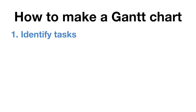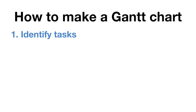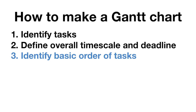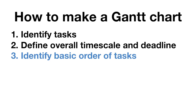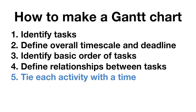Step one is to identify the tasks for your project. Step two, you define your overall time scale and deadlines. Step three, you identify the basic order of tasks. Step four is defining the relationships between those tasks. And step five is to tie each activity with the time.